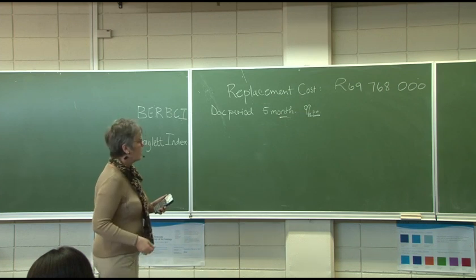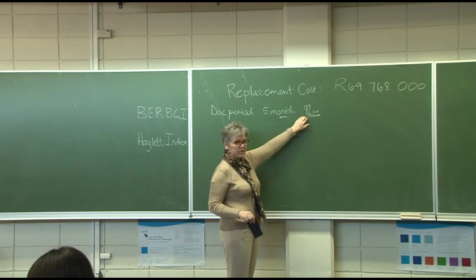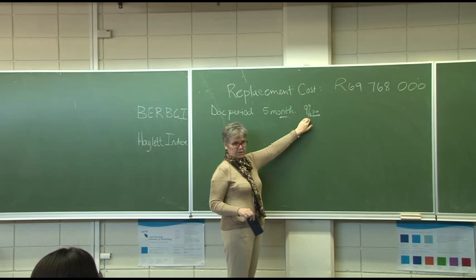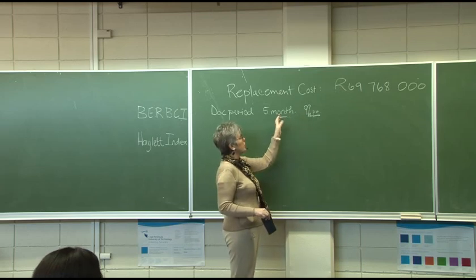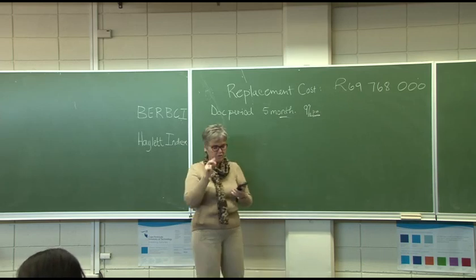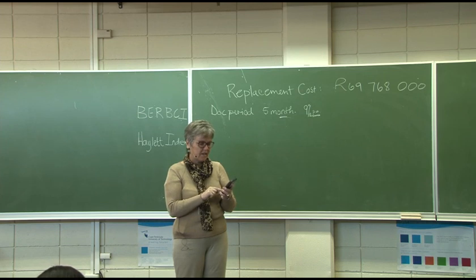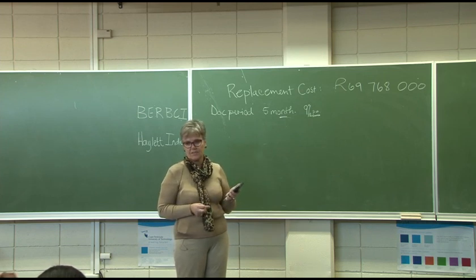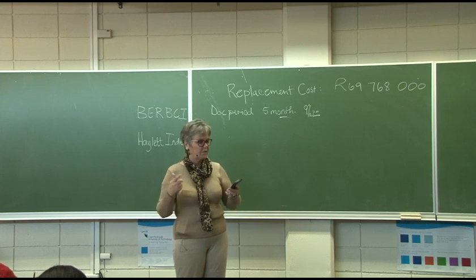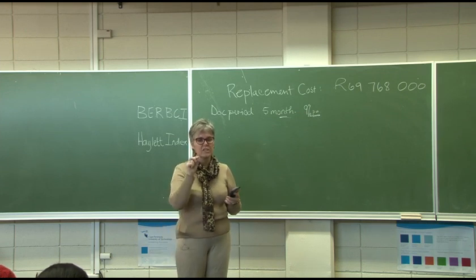Okay, so we have 9% per annum, but we need to change this 9% per year building cost inflation to a monthly rate. So I just always say, you can follow me on your calculators, I just say 9 divided by 100, because that is what percent is. Cent like in cents and rands, like in centurion, like in century, hundreds. 9 divided by 100 gives me 0.09.